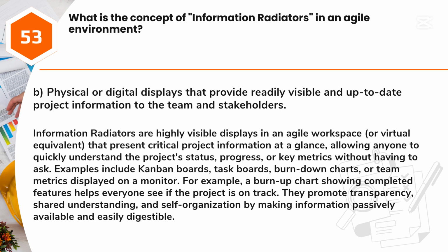Examples include Kanban boards, task boards, burn-down charts, or team metrics displayed on a monitor. For example, a burn-up chart showing completed features helps everyone see if the project is on track. They promote transparency, shared understanding, and self-organization by making information passively available and easily digestible.